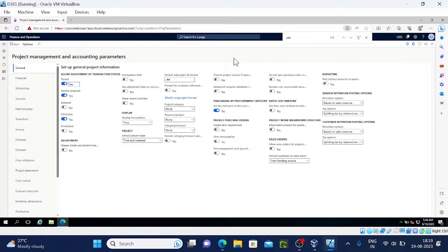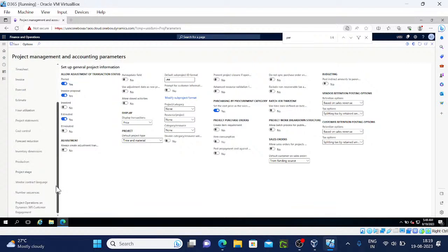The original budget flows like this: the project is created, budget tracking is turned on, and the original budget is created, submitted, approved, and activated. For a revision, there is no need to create the project, since it is already created under the original budget. So for revision purposes, create the revision, submit it, and approve it, and then the revision will be activated.